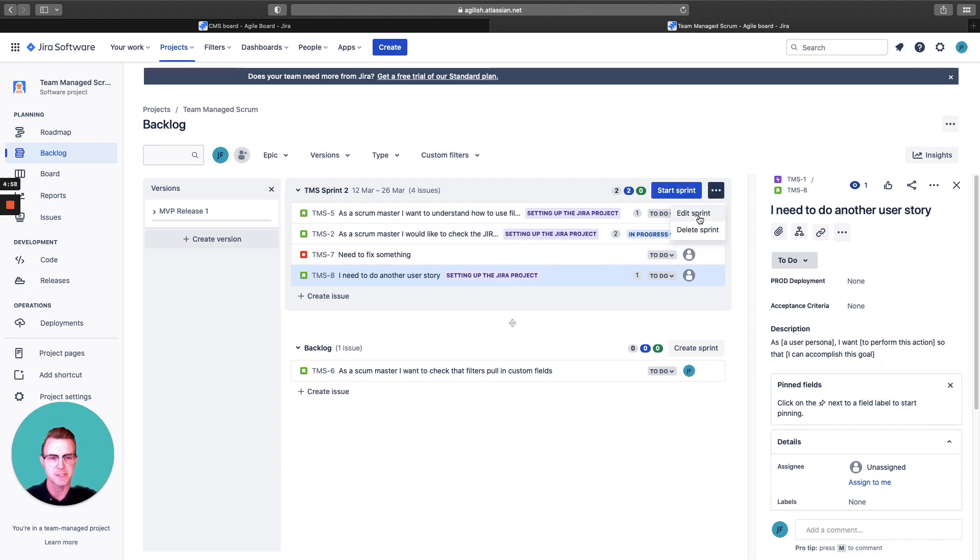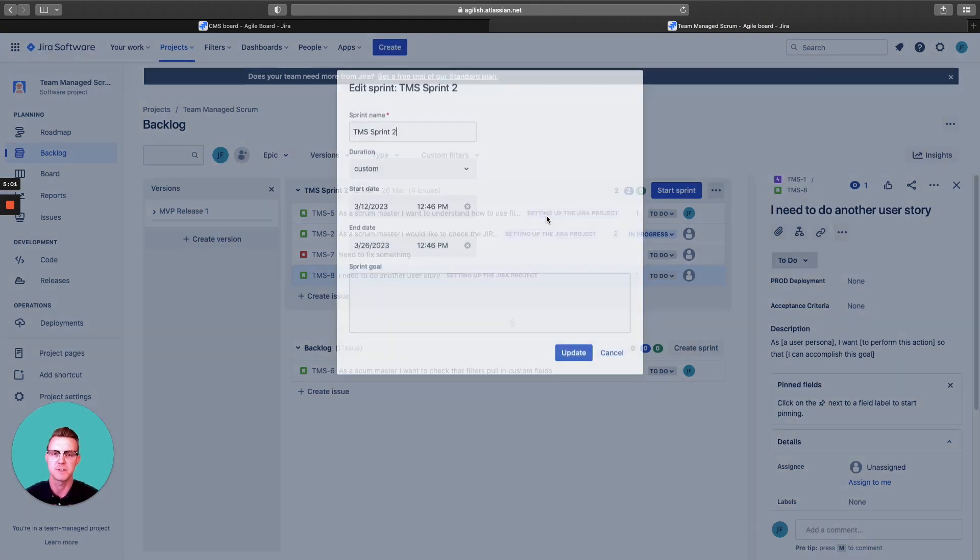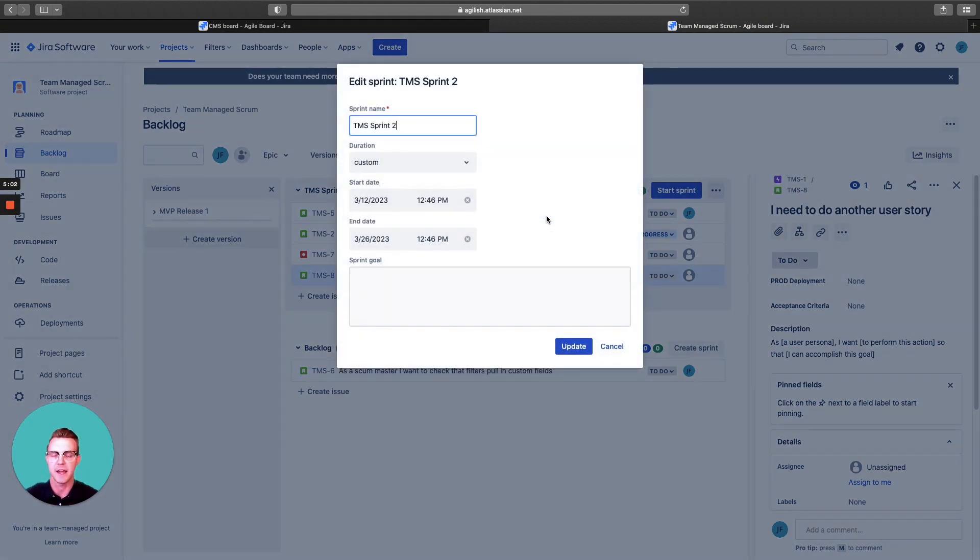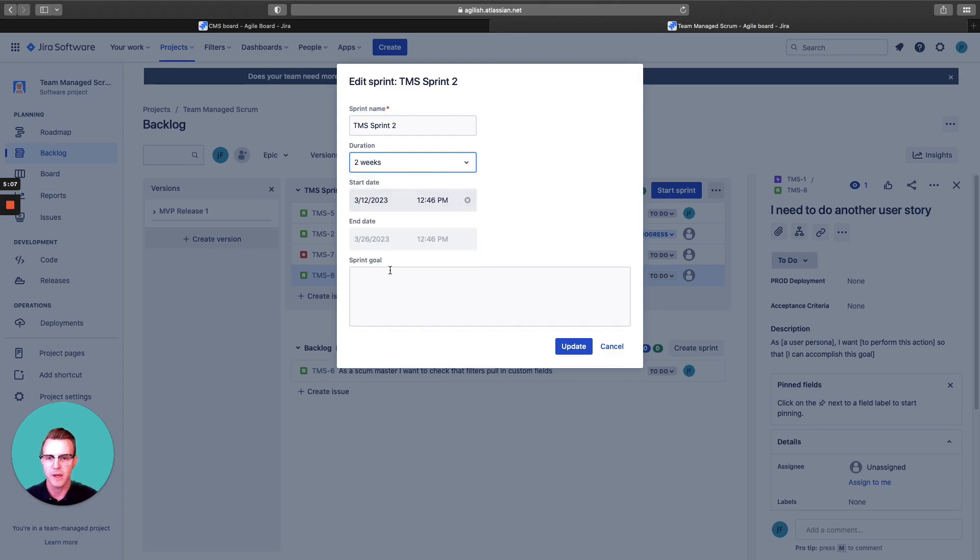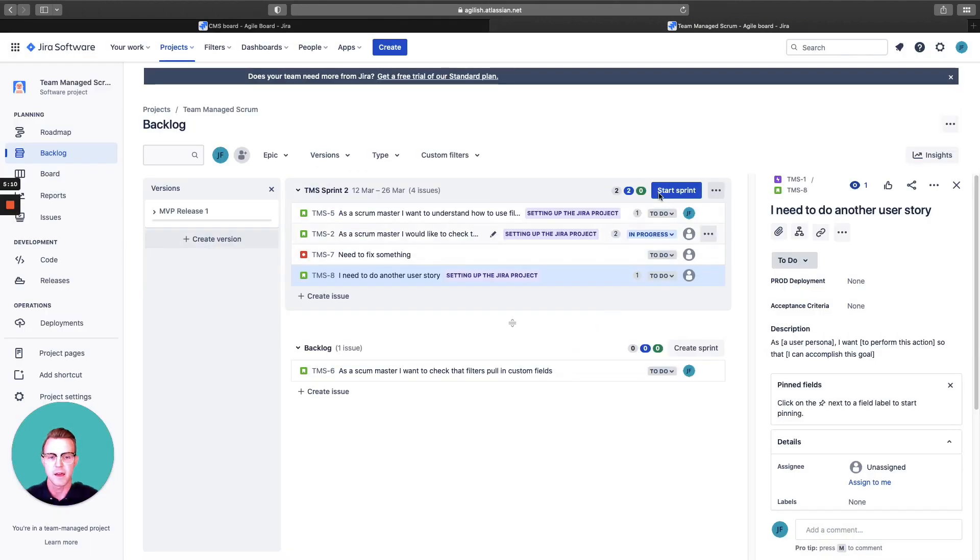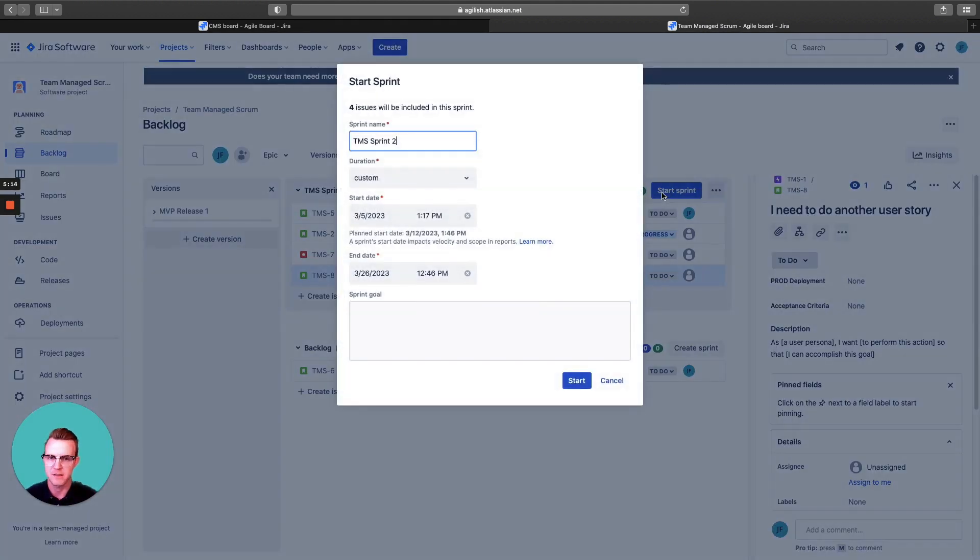You can start the sprint. You can edit the sprint. This backlog is that view of custom duration. I want two weeks. I want one week. These are the dates. These are our sprint goals update. And when you're ready, you can start the sprint. Let's go. We're aligned. Time to go forward.